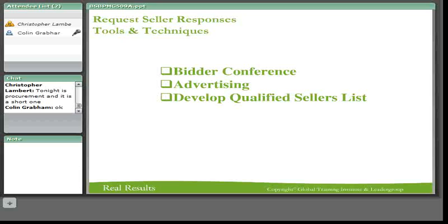Then what you would do is you'd ask them for a price. You ask them to fix it for a year, and you would have more than one supplier. For consumables you'd have two or three suppliers doing the same type of things, or overlapping, if you like, for a year. And then it leaves the user free to choose which supplier he wanted. So you limit the amount of suppliers you've got a contract with to supply from. It's just another way of making a win-win situation for those type of things that you need to buy from a panel. Does that make sense?